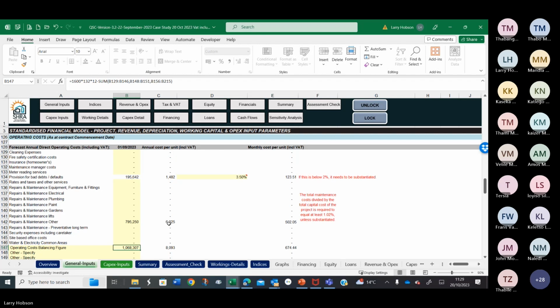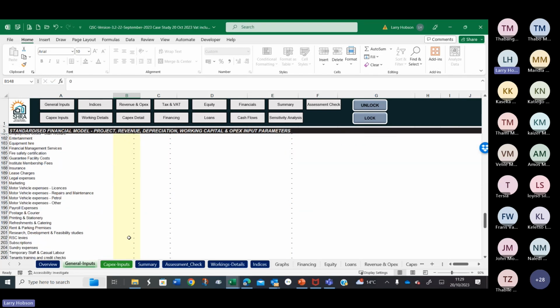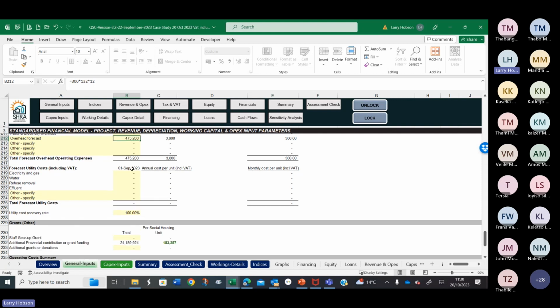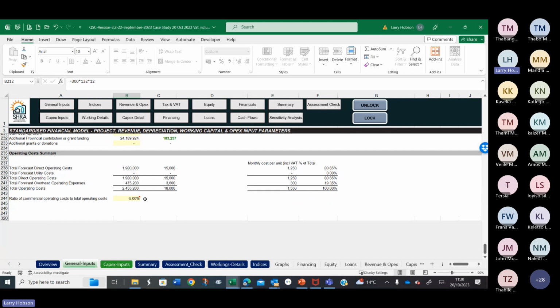For our balancing figure here for the projects, let's try and trim out overall cost here. Let's try and make it 1550. So let's trim our operating costs by that amount. Our overheads are already quite low, and with the way I've done it, it won't make a difference whether we change this figure or the operating cost figure. We can't do anything about the subsidy.